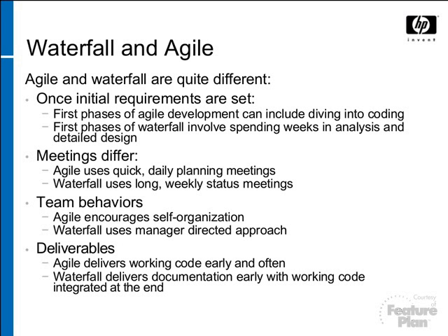However, instead of just the nice to haves, the wants to haves and the has to haves, we actually assign a hierarchy so that you have, first, something that has to be done first that the market wants. But what also goes with that is the development teams assign a risk for how risky it is for them to do, and the priority and risk together decide what will go first into the code. They only map out the first few features that will be in their first iteration.